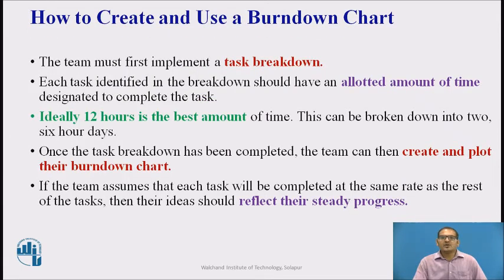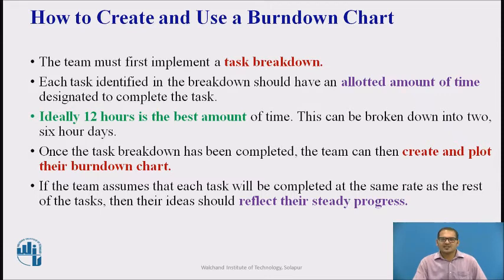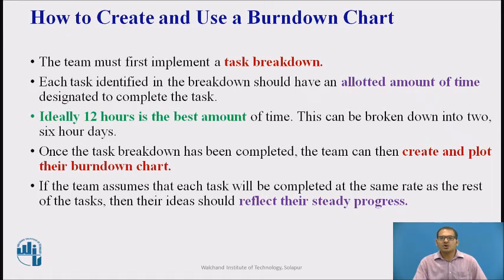To effectively create and use the Burndown Chart, the team must first implement a task breakdown. This usually happens at the sprint planning meeting. Each task identified in the breakdown should have an allotted amount of time designed to complete the task. Ideally, 12 hours is the best amount of time, which can be broken down into 2 to 6-hour days.